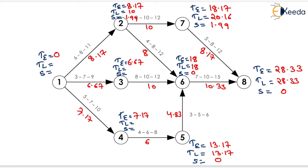The TL value for event 4 will be equals to 13.17 minus 6, which equals 7.17, and the slack will be equals to 0. The TL value for event 3 will be equals to 18 minus 10, which equals 8, and the slack will be equals to 1.33. Now the TL value for event 1 will be equals to 10 minus 8.17, or 8 minus 6.67, or 7.17 minus 7.17 — the minimum value will be the TL and it will be equals to 0, so slack will be equals to 0.